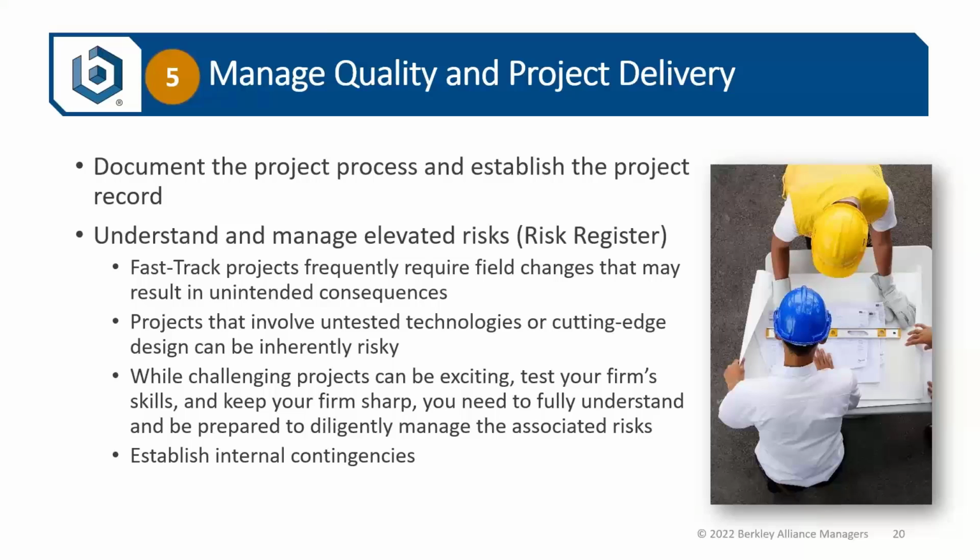Once the project is under construction, we do recommend that the contractor or CM be the primary documenter of the project process. And again, there's value in being the author of the project record. You have to share those notes with the design team, with the owner's team on a contemporaneous basis, meaning within a few days of a meeting or a field report or things like that. You have to give them the opportunity to respond within a certain number of days before it becomes part of the project record.